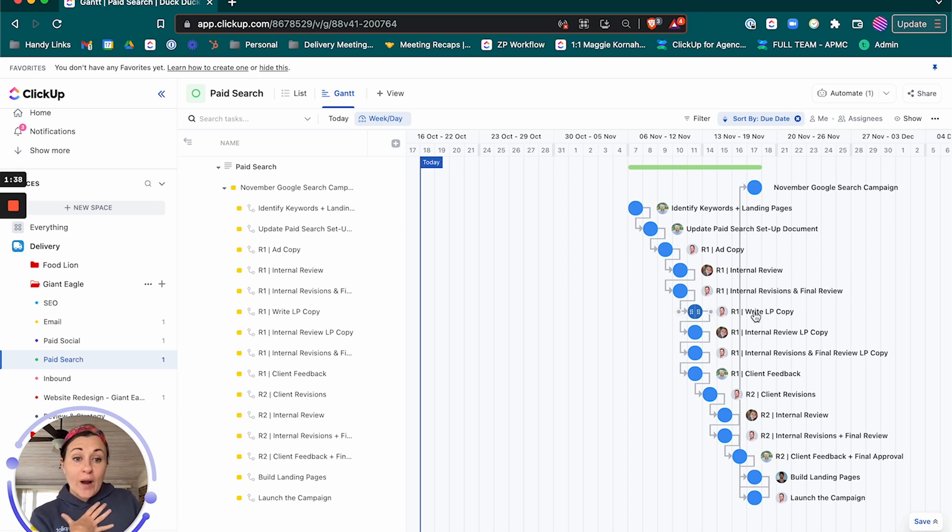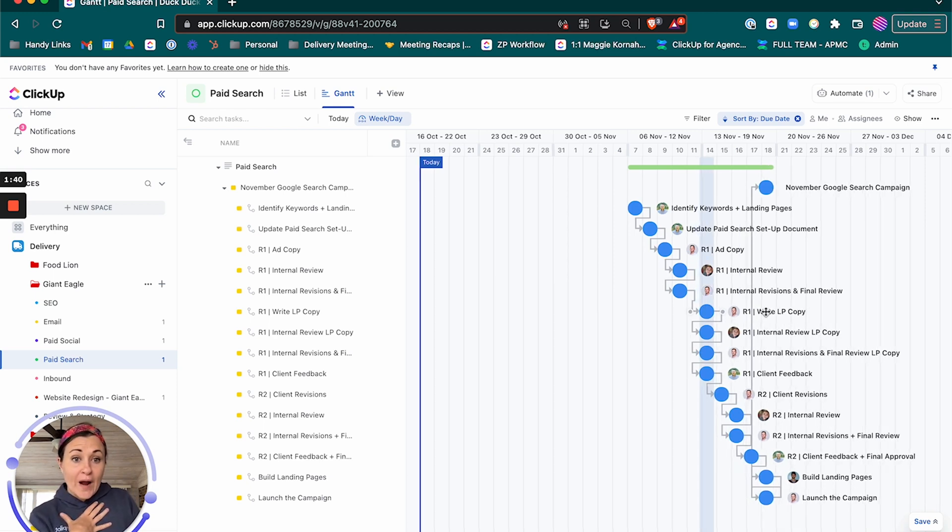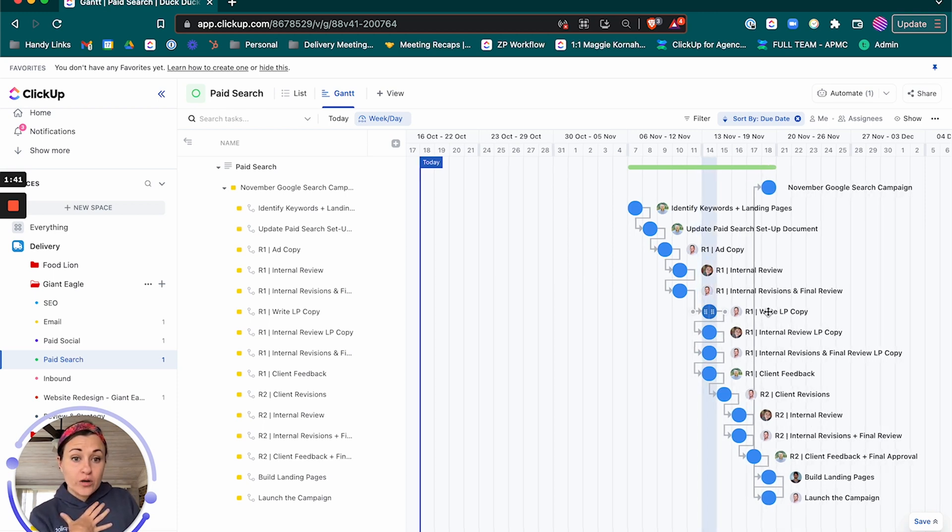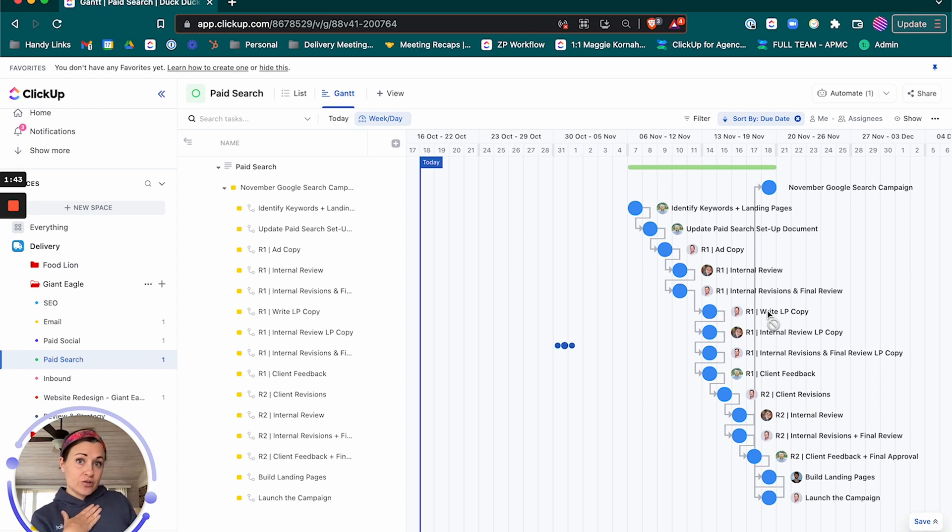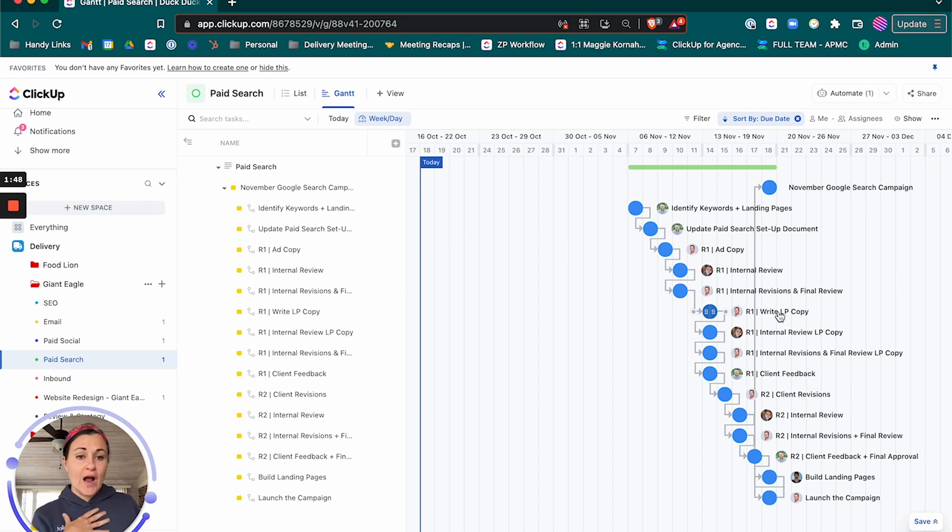So we're going to grab this item here and we're going to drag it forward and notice how everything after it comes along with it. That's great. That's because it's dependent upon that first task that we dragged.